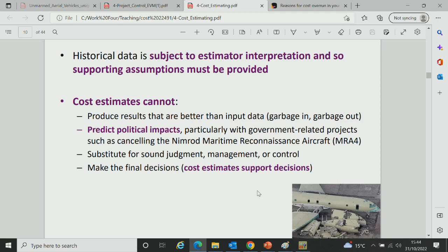In the construction industry, they have something called SPONS, which is publicly published cost data or norms. In other words, the price of a pump is this, and the effort it takes to install a pump is this. SPONS is published, I believe, by Davis Langdon. I believe that's the case. They're a construction cost management consultancy.